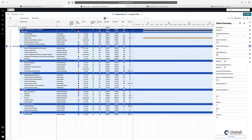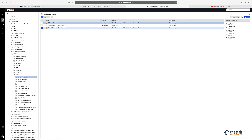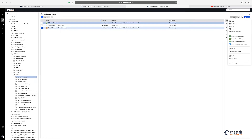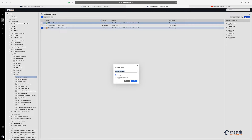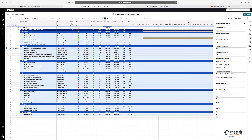However, I can't actually bring that information directly through into a chart on a dashboard. So what you need to do is create a report. I'm going to do that quickly now — I'm going to create a report. It needs to be a sheet summary report because my data is not in the sheet itself, it's in the sheet summaries.